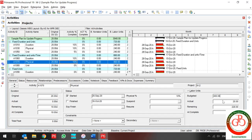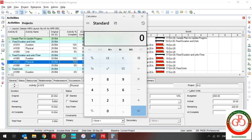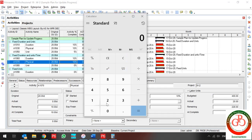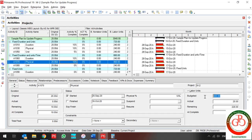When I enter a new digit, it means this activity's rate for each day is 20. So my budgeted labor unit is recalculated by the software. My original duration is 20, and my budgeted labor unit for each day is 20, so 20 multiplied by 20 equals 400. My estimation for budgeted labor unit changes completely, and my remaining duration and at-complete duration are updated.